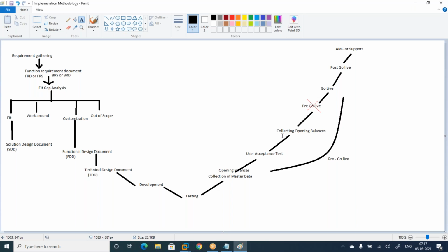And then a copy of this repository is released to the user acceptance test instance where they go and play around. And then on the date when they finish, for this example, on the 30th of June, assuming that you have a 4-week time period for user acceptance, the delta from the date you started to the 30th of June, you collect the delta on this and then load it and make your production from the system.